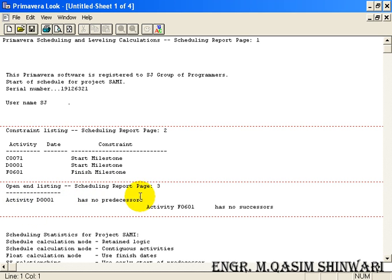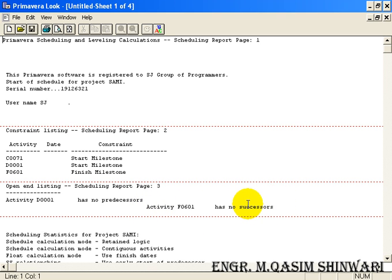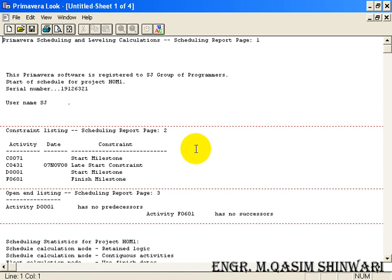If you have not defined the successors, all activities will appear between the two red lines and it will say the activity has no successor — for example activity F0601, which is the Completion, has no successor, and activity D001, which is the Start, has no predecessors.